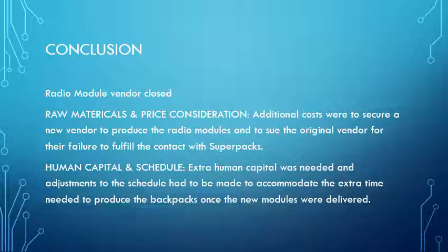Preparing contracts that did not hold us accountable for failure of a subcontractor to deliver the product was a valuable safeguard to reduce the impact of a vendor shutting down. Unfortunately, the additional cost to hire a lawyer to recover the lost funds was necessary and forced us to use our contingency reserves to pay litigation fees, but we are still hopeful the funds will be recovered when the lawsuit is settled.